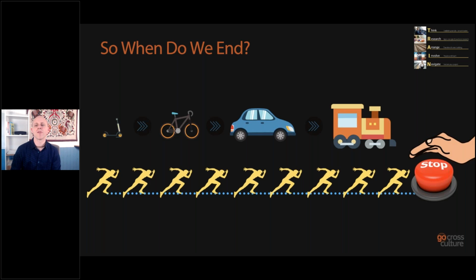3 months down the road, we hit some snags. We've missed something. We've underestimated. We realize it's going to take 2 months longer. And plus, the vision of the customer has changed. They didn't realize that they'd asked for all this stuff up front, just like when somebody goes out shopping to buy 3 months' worth of things. They didn't need all of that. They took too much on. So actually, the customers realized that we don't need all of that. So we made a mistake. We built more than what was required. There's a waste. So when does the product end? When does this project end?